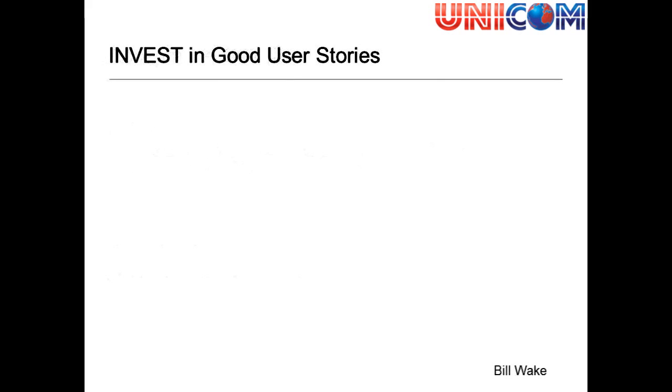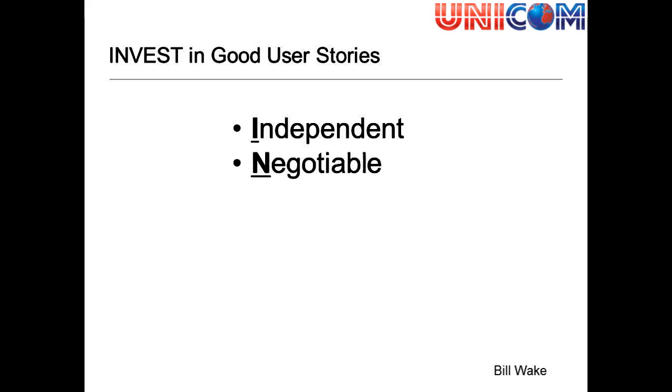So when building or writing my user stories, I recommend this INVEST acronym for writing good user stories. So they need to be independent. So they need to be developed, tested, and potentially delivered on their own. Therefore, they can be independently valued. They must be negotiable, so remember that they're a placeholder for requirements to be discussed. They're not a contract. So they have just the right amount of detail where we can discuss them and negotiate.